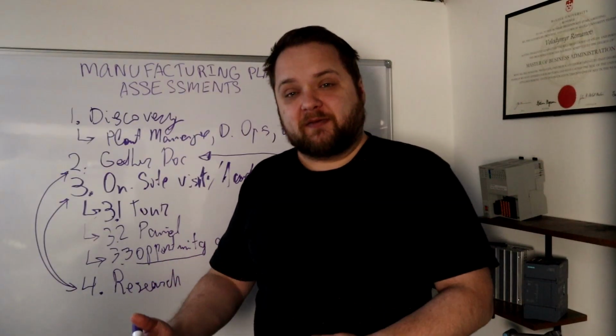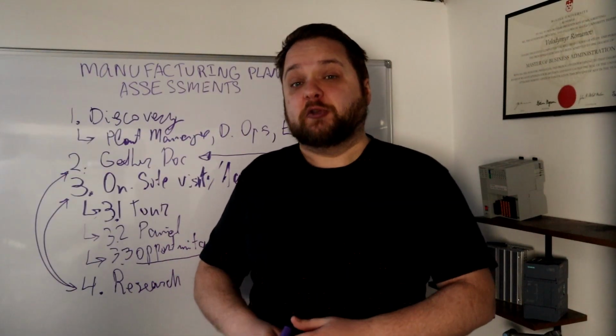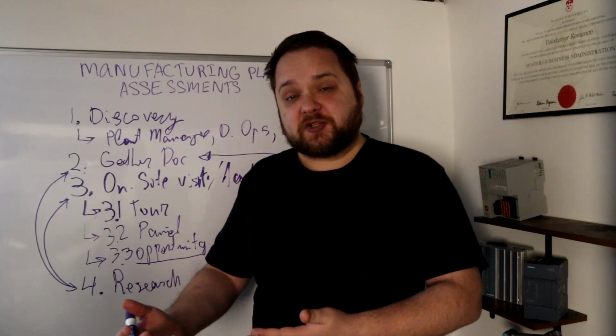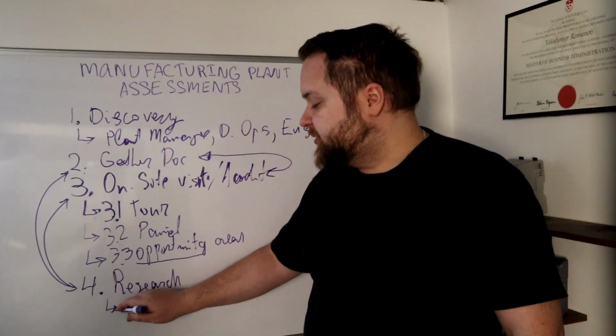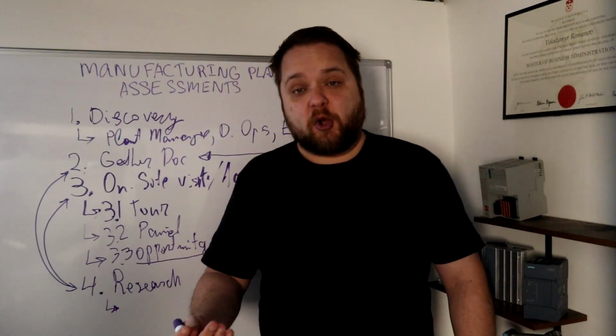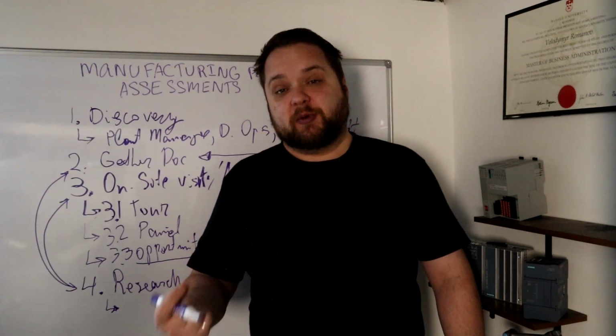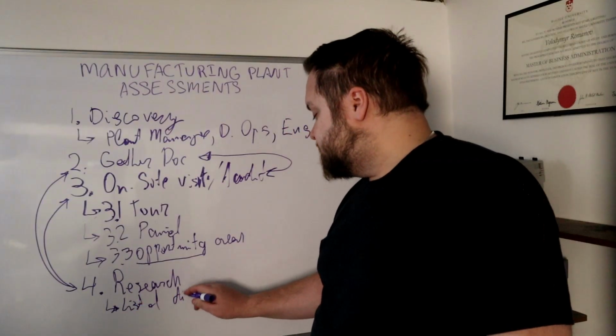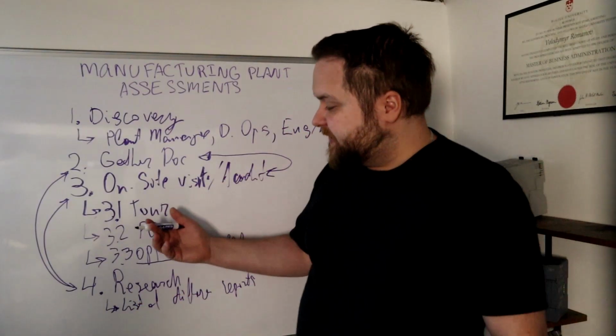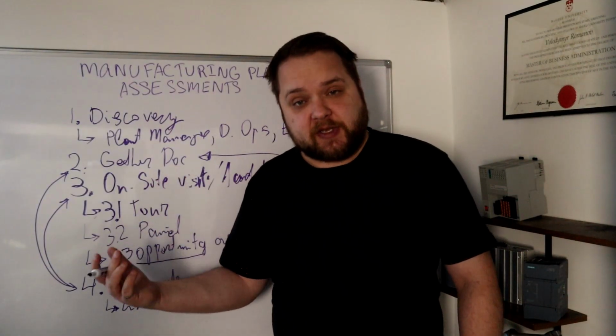So you need to make the phone call, you need to send emails, you need to reach out to the equipment manufacturer to understand ultimately, is the piece obsolete? Is this a critical component? Is this something that needs to be replaced? And so you're putting together a list based on your visit, and of course for different stakeholders.